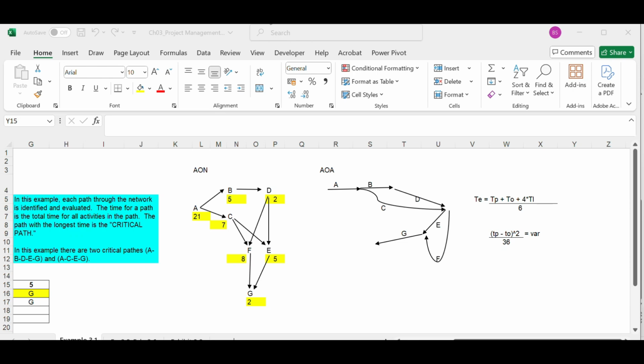If your learning curve is 50 percentage, first time you may take 60 minutes for completing a task. After that, the second time, you will take 30 minutes, because the first time you took 60 minutes, so the second time you will take only half that time. That is 30 minutes for completing the task. Third time you will take half of the 30 minutes. That is 15 minutes only to complete the task.